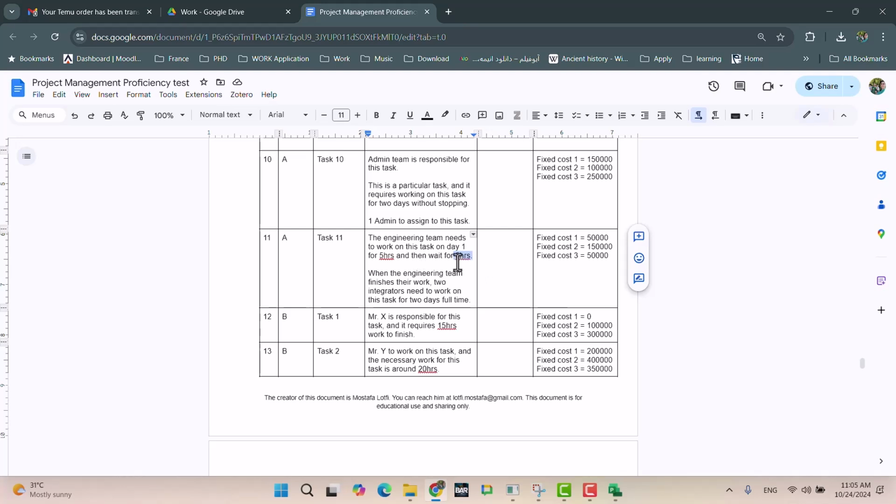Just keep in your mind that these 5 hours is kind of a relationship between these two resources, but it's not something that you can define in software, but you have to keep it in your mind. If it's required, you need to update it manually in your planning.